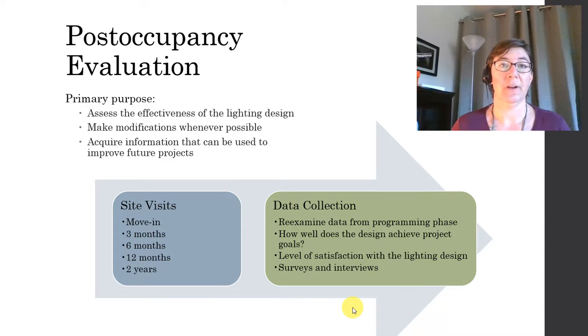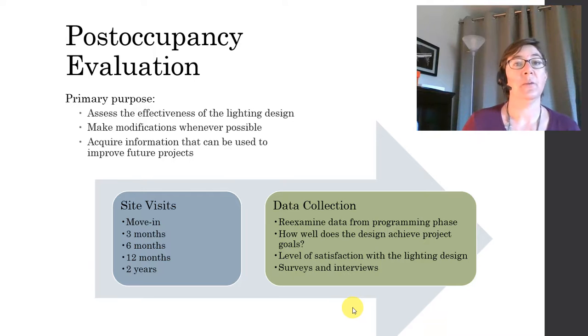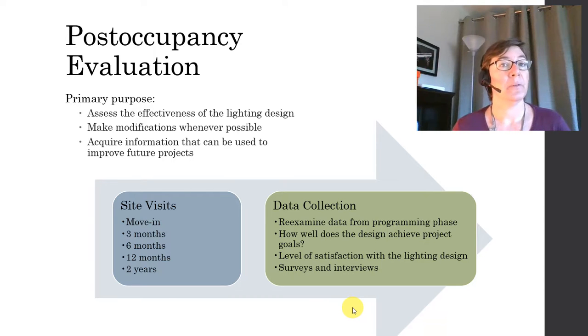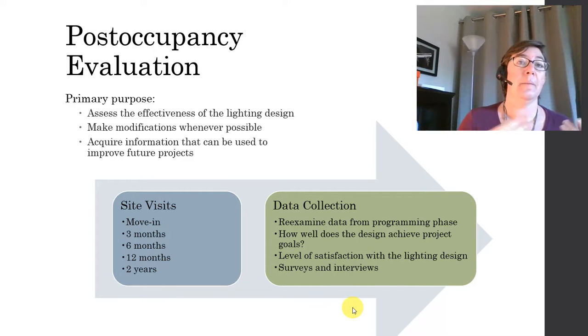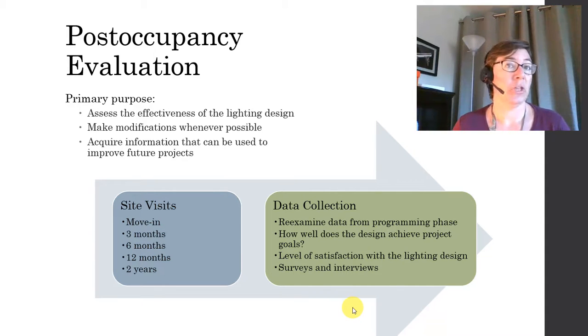After the project is constructed, the client has moved in. One last thing that you as a designer need to do is a post-occupancy evaluation. The purpose of this is to look back and assess the effectiveness of your lighting design. Did you do a good job? And learn from what you did. In this phase, you need to make modifications if and when possible. And you acquire information and data and analysis that can be used to improve your future projects.